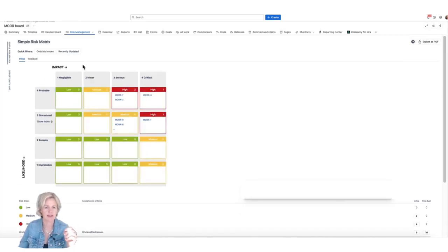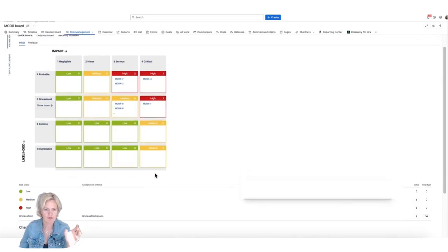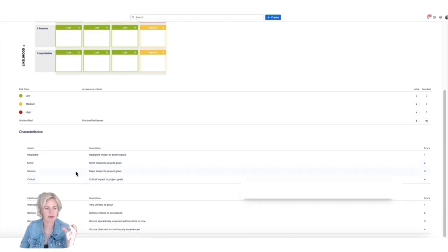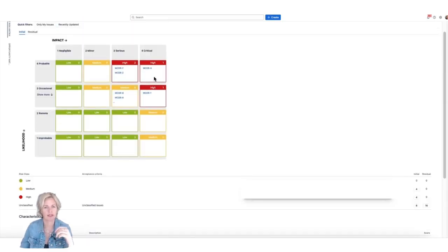And for risks, it's a simple risk matrix. You have the same 4x4 matrix, and as always, impact and likelihood axes, negligible impact to critical impact, and improbable to probable in terms of likelihood. The higher the risk, the more important it is that you start planning and implementing mitigation actions so that this risk will not arise and negatively impact achieving the business goals. That was the second step, the risk models and opportunity models that you need to create.